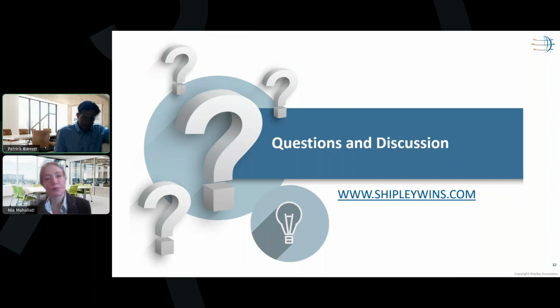Okay, well, that's a good question. There's a lot there. So the government, when it comes to their acquisition approach and using OTAs, it really comes down to what objective are they trying to achieve, right? A lot of times when they're bringing in non-traditionals, they haven't worked with them, they haven't vetted those non-traditionals like they have with some of the more traditional defense industrial base companies. So a lot of times they'll do parallel activities. That's where you start to see maybe 4 companies or 3 companies or 2 companies that get an initial award, and there's milestones they need to achieve, and then there's some kind of down select. The reason the government's doing that is because they're trying to manage risk, right? They don't want to put all their eggs in one basket. They know that through that prototyping effort, they're going to end up getting the best solution as quickly as they possibly can.